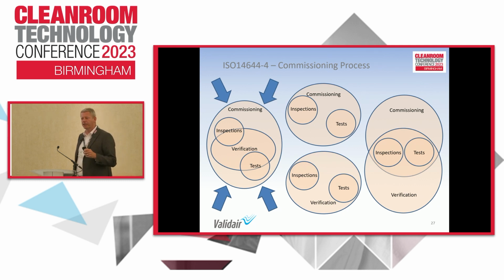So when they refer to commissioning, it's everything. So the commissioning period is everything. It's the turning on, adjusting it, setting it up, getting it ready and balanced, recording, taking out those measurements, and then it's also all the verification tests, the filter integrity tests, the pressure tests, particle counts, etc. All come under that. So in 14644, it's one umbrella. It's all under that one umbrella.